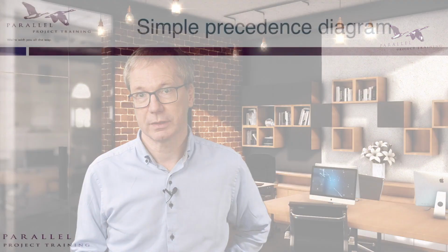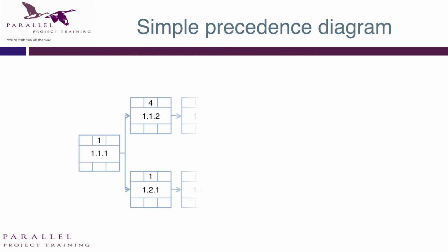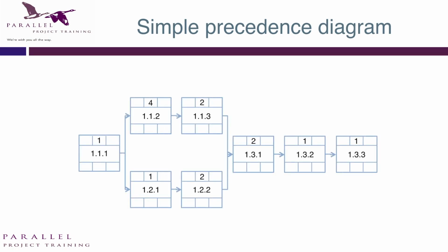So in my example, it's probably 6.5 days, from Monday evening to the following Monday morning. And that's the amount of time you can put your homework down and not do it, but still complete your objective. Now in a project, some things have float and some things don't have float. So from here we can develop the precedence diagram, understand how much float each of the tasks have. So here's a simple plan with two paths, a top path, a bottom path. The durations are shown in weeks. So how long is it going to take to do this project? Well, the longest path is the top path. Add up the durations on that top path, you're going to get 11 weeks.